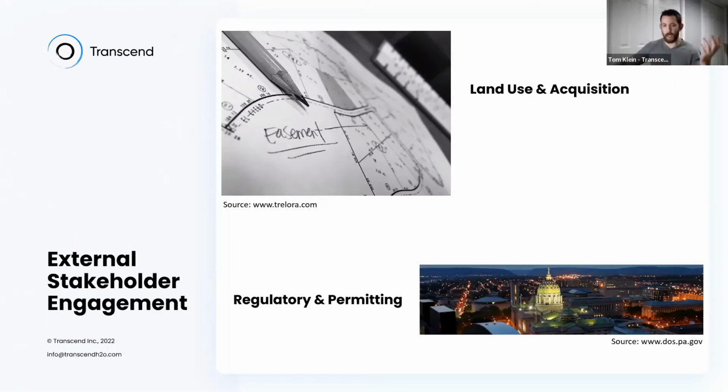So I've got a couple of examples here about some of these situations where you need to engage external stakeholders for the benefit of your project. One of those is land acquisition. I've had a lot of projects over the years where a big component of the project was either evaluating a new site, building a new site, so a greenfield, but you needed to acquire a new parcel for that facility. And in many instances, that means going through some form of township land acquisition process, land development process.